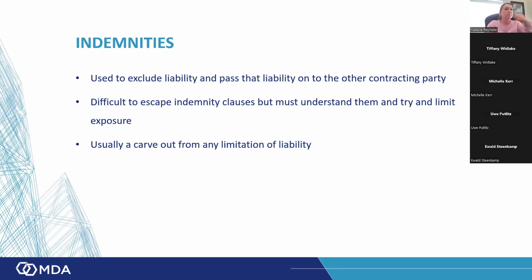the indemnifier only comes into play if the indemnified has some obligation to make up a loss. But if that loss hasn't been incurred, the indemnifier has no obligation. And does the obligation to refund the expense or the liability for the loss occur after payment or before payment? And then the last bit is, what happens if the indemnifier is insolvent? Where does that leave the indemnified?